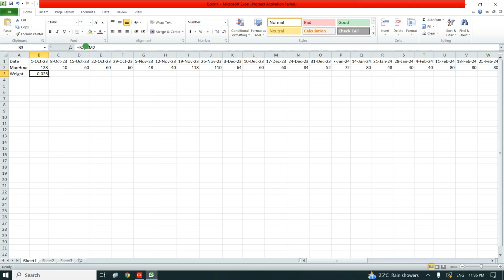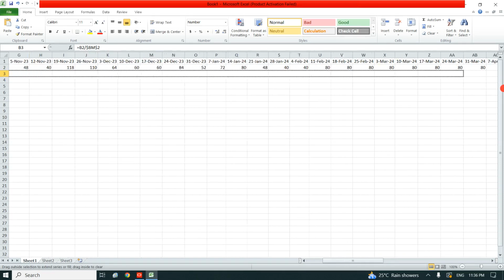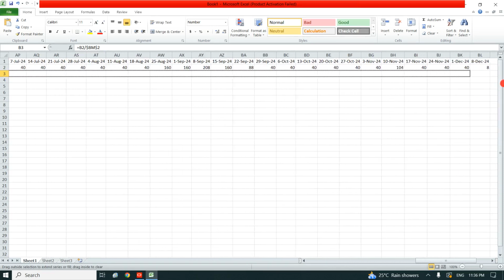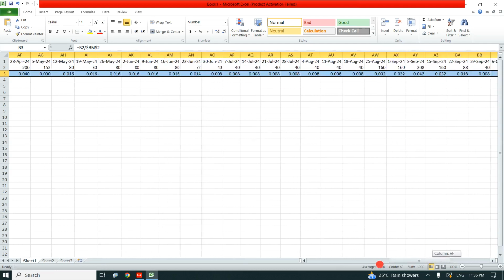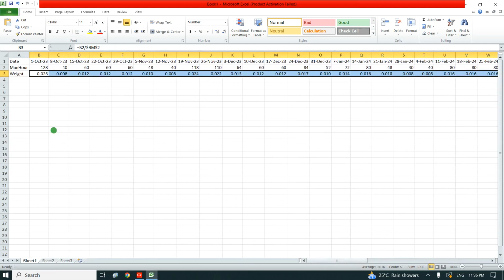I just need to freeze the total man hour cell by adding a $ sign in between. You see, I add it at the beginning of the alphabet and at the end of the alphabet before the number. That's how I do the autofill. At this point, I can now autofill it. Okay, I autofill it. This is my man hour by each. This is my weight by each man hour.